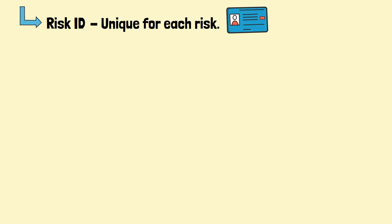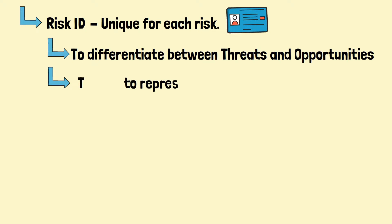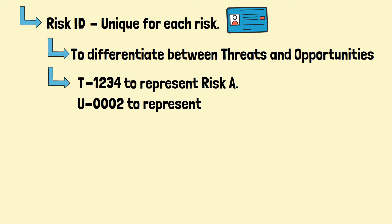It would be good if the ID can differentiate between threats and opportunities. For example, you could use the alphabet T to represent threats, followed by numbers. Similarly, the alphabet U could be used to represent opportunities.